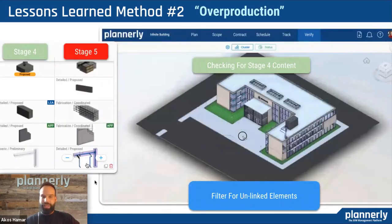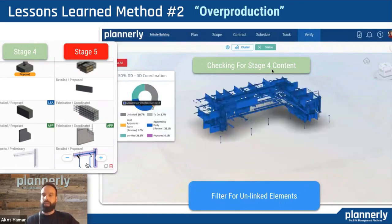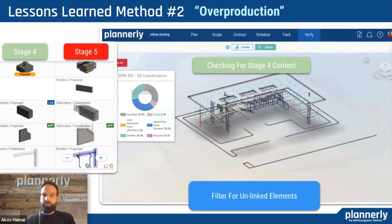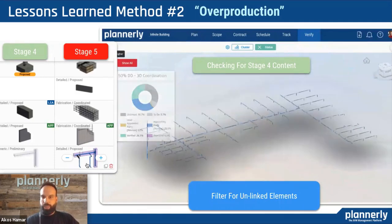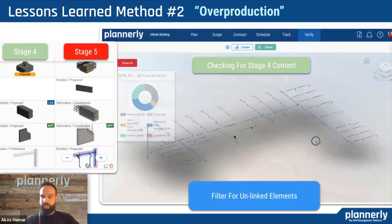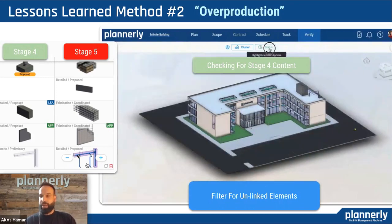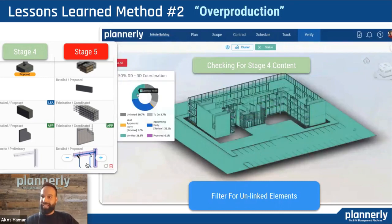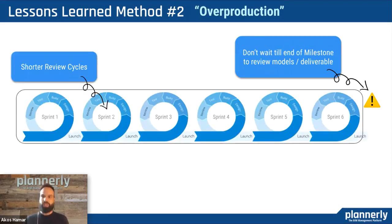The way of addressing overproduction is having the plan in place and following it, but also identifying if something was produced too early, too fast, too much. Check the model — for example, in stage 4 content, filter for different statuses and look for anything unlinked, not attached to any tasks. On stage 4 we were only requesting that mains be modeled, but filtering the model may reveal some branches also modeled. It's almost guaranteed the architectural design will improve — fixtures and walls will move — so those pipes end up in the wrong location and have to be remodeled. The lesson learned is not to wait until the end. Break the project into smaller chunks, time-wise and location-wise, and have an opportunity to check early how the models were created. Use shorter sprints and capture overproduction as soon as possible and report it back to the team.